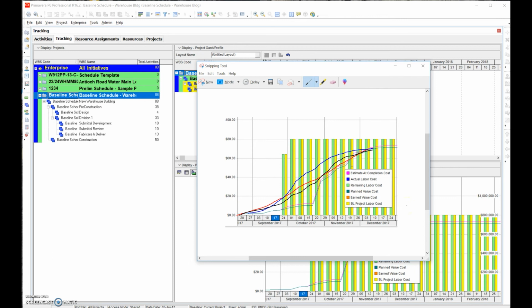And the reason being is because we're early on in construction. We're not doing anything unethical. We just got to understand if we're above that theoretical line, we're essentially asking for more money than we're probably earning. So we don't want that to occur. We want to be as close to what theoretically we should be. And that is not so clear on the front end. And that's why we got to move money around.